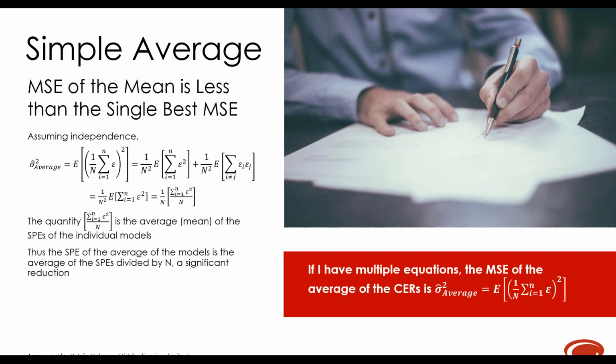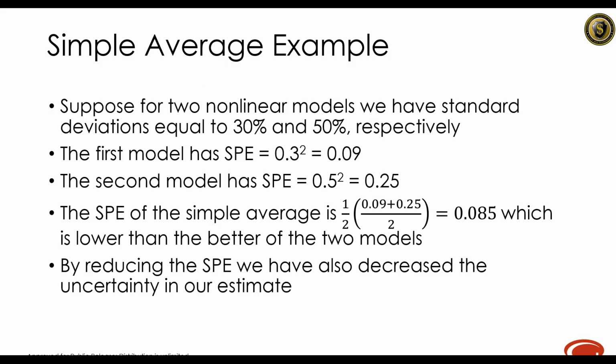And the simple average. You can do a little bit of math here, and basically the average error is roughly, assuming independence among all the estimates, 1 over n. So you've reduced it by a factor of n. That's a pretty significant factor if you have a lot of different estimates that you're combining. Even if you have 2, you basically cut the variance in half. Okay, next slide.